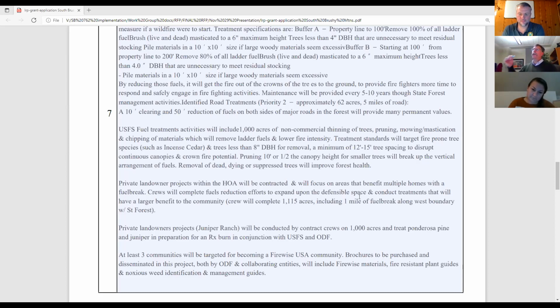So those are funded. But then we'll get to that 5th project or that 6th or 7th where maybe it comes in as a $3.2 million project, and we're finding that we only have 2.1 available. Then we'll be able to discuss it with that entity and have a little bit of back and forth and say, well, okay, can you utilize 2 million rather than the 3.3 you asked for, or whatever the case may be? And if so, what accomplishments can you count on? What's the different landscape, maybe if you needed to pull back a little bit of that project and utilize this funding? So that's where that would probably work.